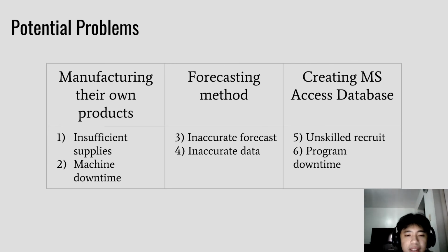The risk event trigger is the wrong forecasting technique or wrong inputs of data. The potential impact is not enough supplies with many demands, or many supplies with few demands. The likelihood will be 3, but the severity is 5. So the risk score will be 15. To prevent this from happening, always double check when inputting the data. But the corrective way is to apply problem analysis to see where the error started.